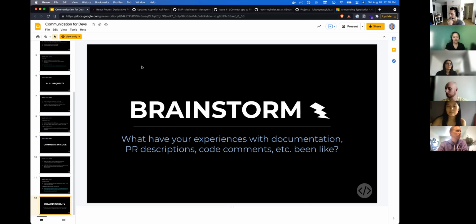Yeah, this is getting into project management. One example is our company just launched in the UK. So we had an epic called UK launch. Then I had a story to add cookie consent for GDPR. And under that story, I had different tasks for that. So it becomes more and more granular. Gotcha. Cool. Thanks for sharing. Thanks for asking.